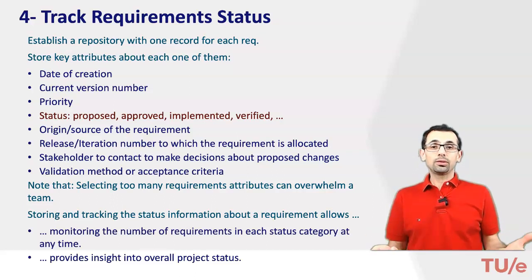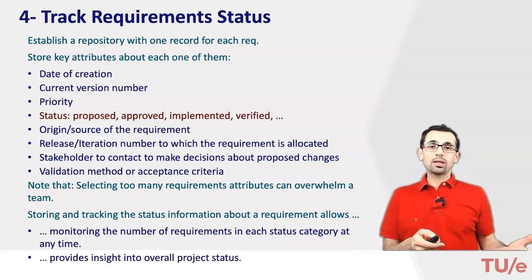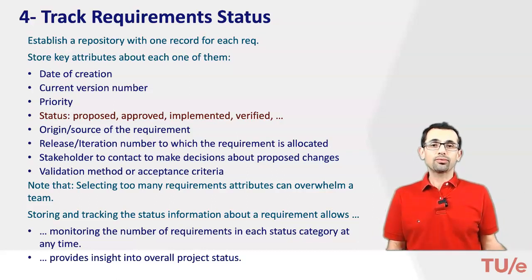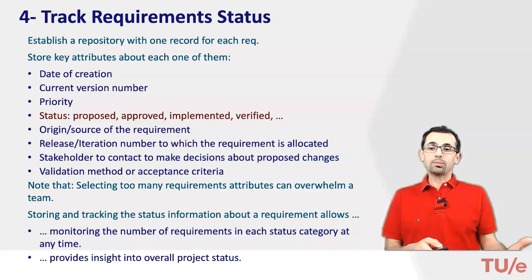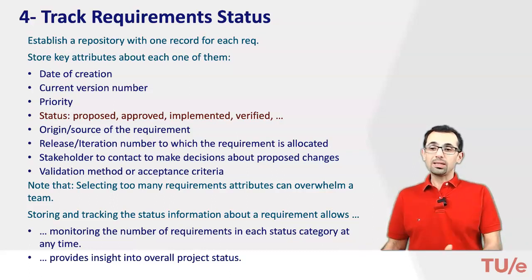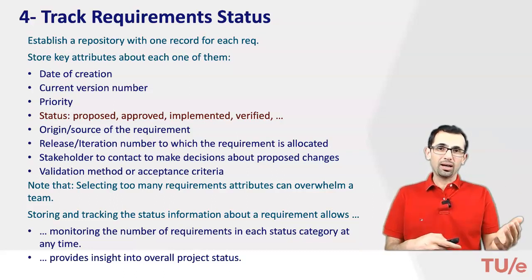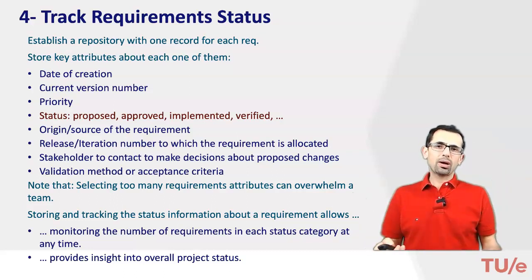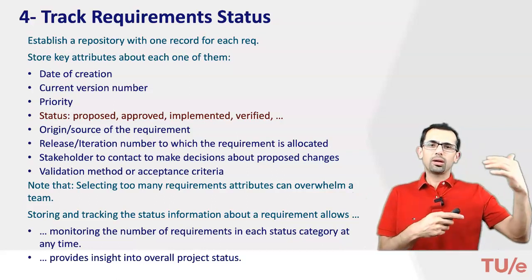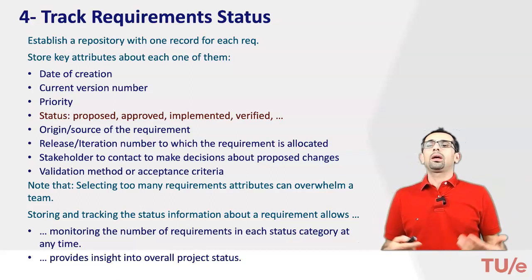Of course, storing and tracking statistics information about the requirement status gives us some opportunities, like monitoring the number of requirements in each status category at any point in time, which provides insight into overall project status. So we can have a very good idea about how many of the requirements are stable, how many of them are defined, validated, verified, implemented, and so on.